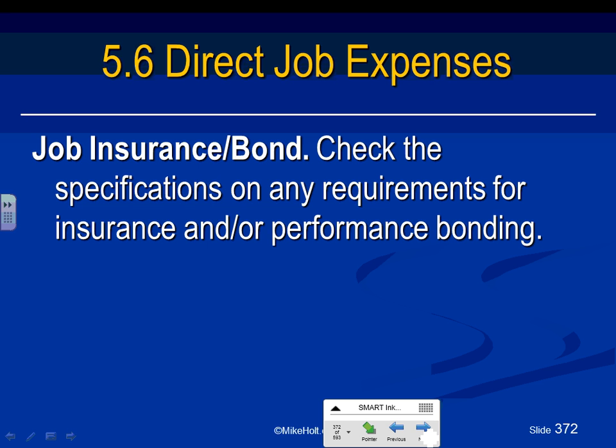Job insurance and bonds. If you have a bond or an insurance, you have to accommodate for part of this bond or insurance directly to the job that you're doing, right? Who's going to pay for the interest on this bond or insurance?